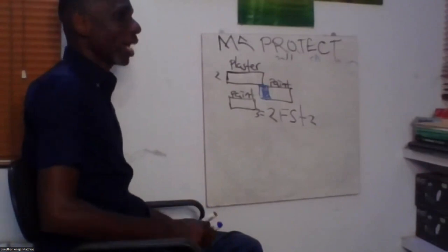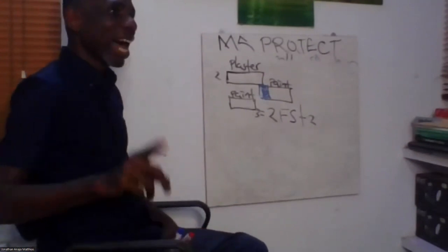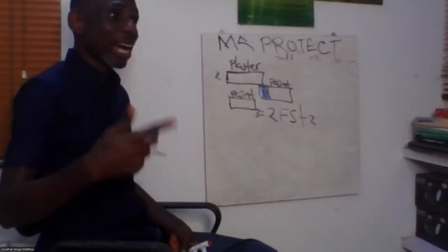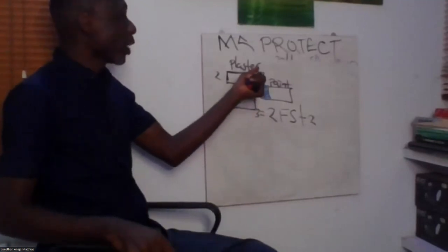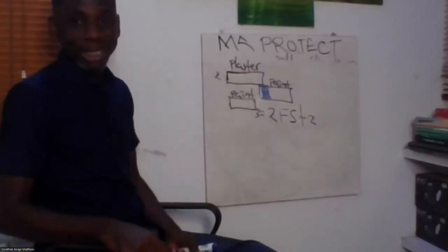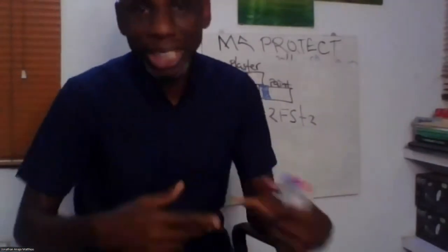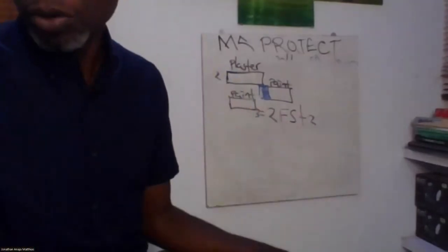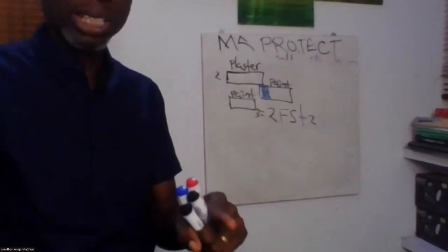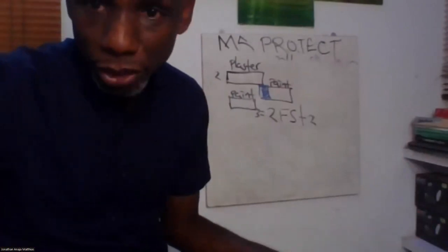And like I told us, when something is on your critical path, as much as you can, avoid using a lag. Rather, apply any of your schedule compression techniques. You can ask your team, they can come up with ideas. I know people who artificially dry wall because they want to get it painted. So if you are time pressed that way, you can actually go to your critical path and do a lot of things. But most importantly, try as much as you can to apply your schedule compression techniques on the critical path while you are applying your lag on your non-critical path.